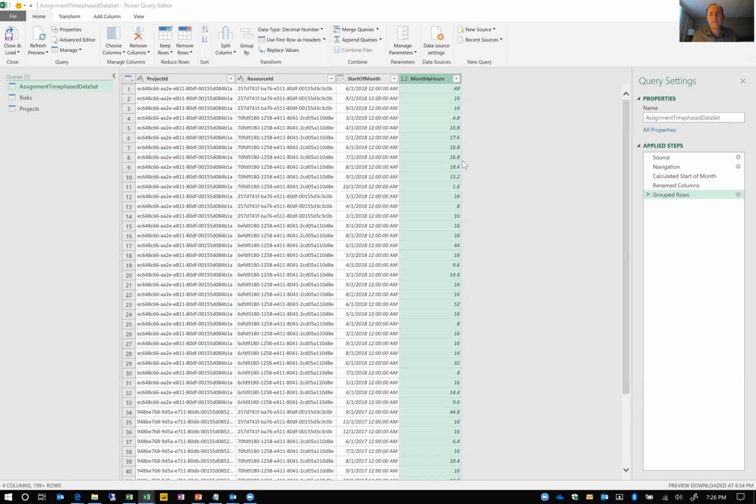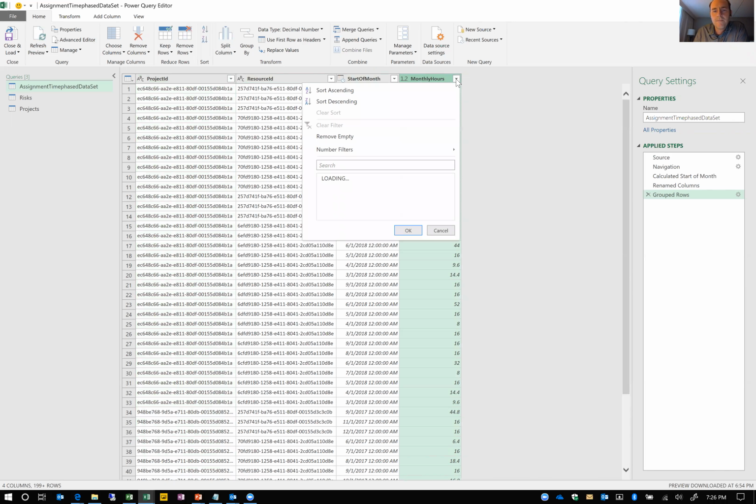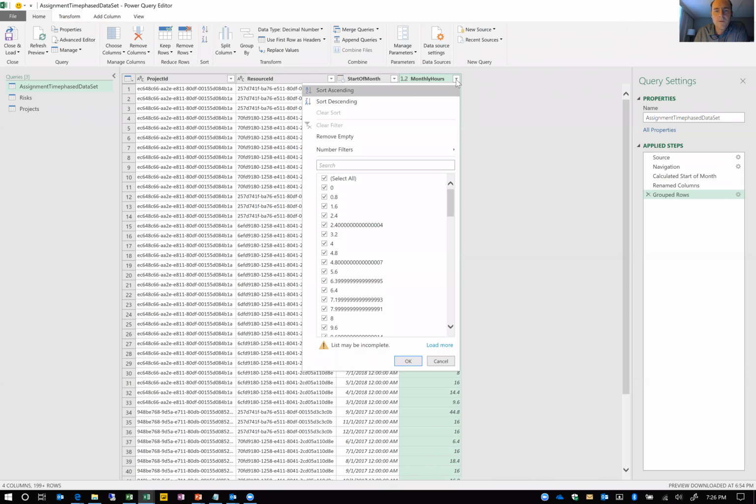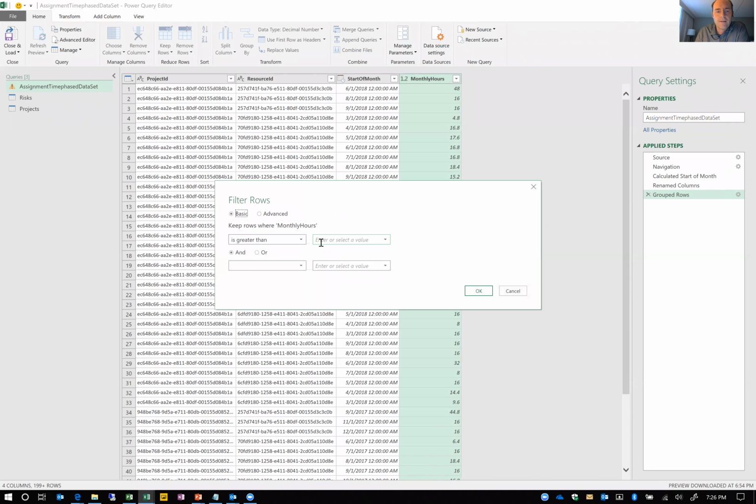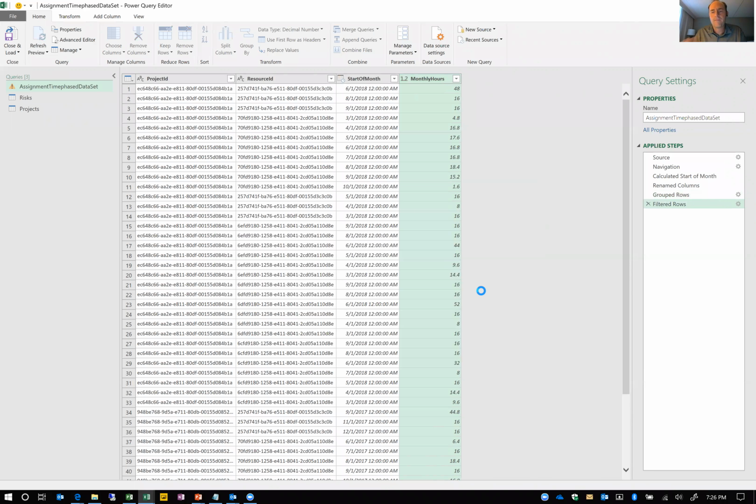There, it's done. All right, so what it's done is projects, resources, start of the month, total hours. And I'm going to actually filter this because I'm only interested in over allocated resources. So I'm just going to say, show me all these months that are greater than 160. Again, we wait a little bit for the query to execute.